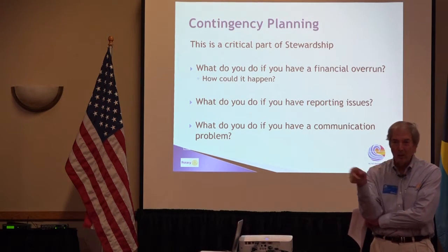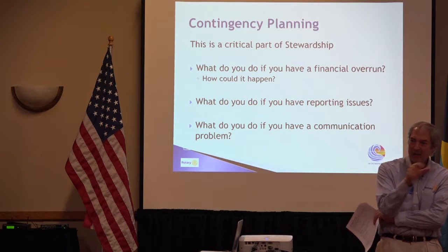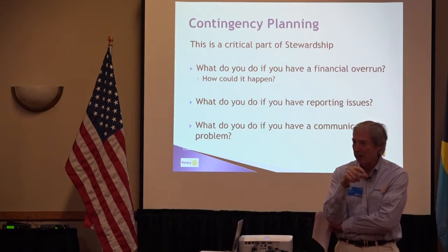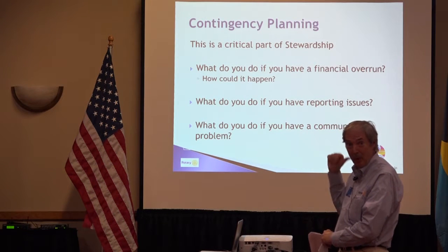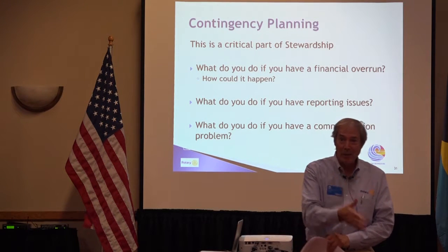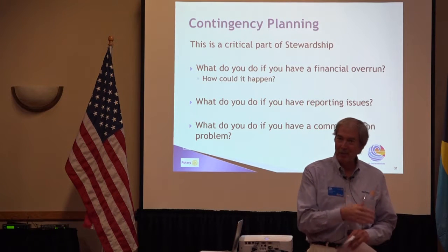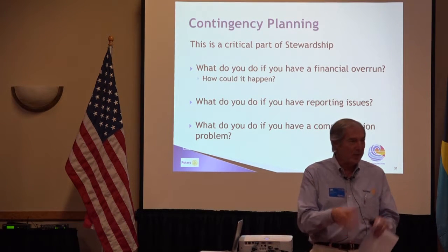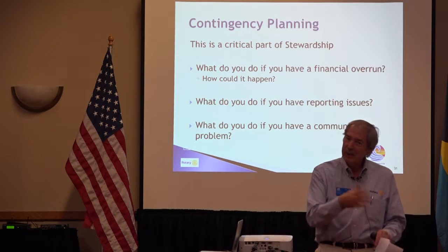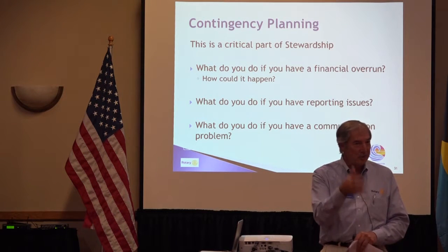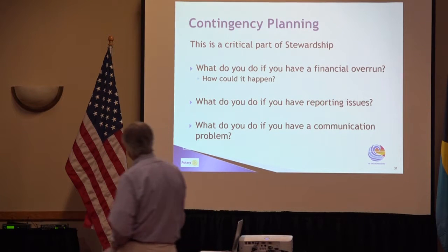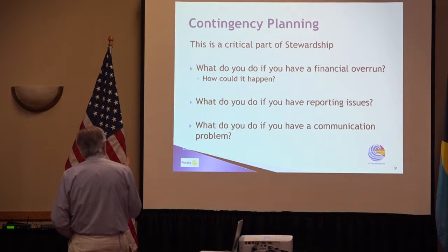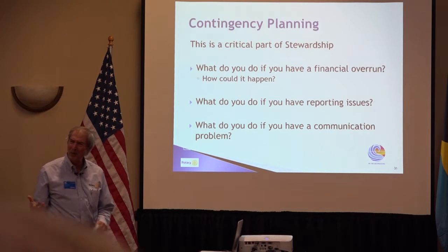I've divided my 100 wells up into groups of 25, and so after I've done 25, I'm going to write a progress report within 3 weeks, and I'm going to put that on my project plan. Because that way, if I don't quite have all the data, I can either finesse it or go get it or whatever. I can figure out how to do it, and I've still got something that relates to that point. Okay, so that's a way to think about reporting issues, but there's other ways to think about it too.